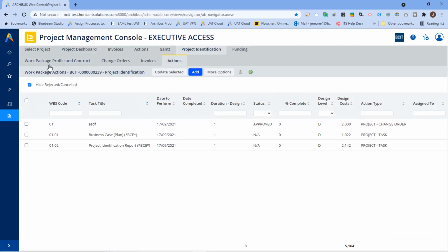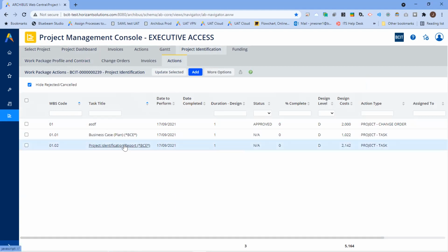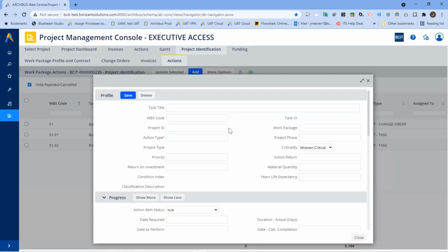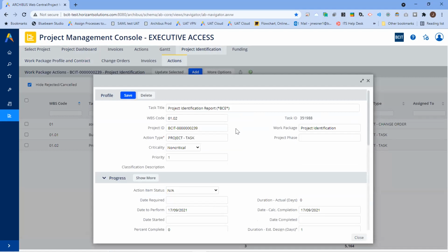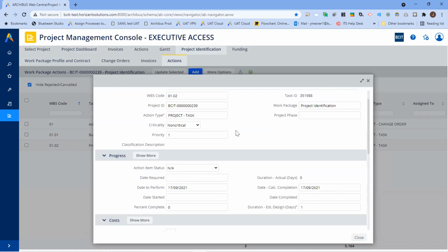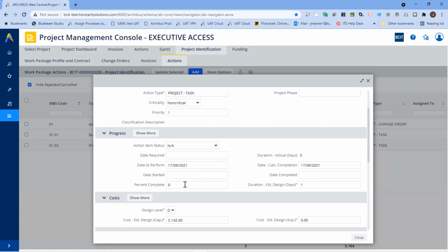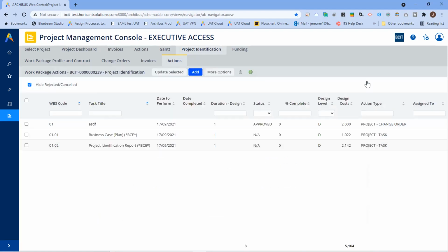One would be to go in from a work package perspective, look at the action tab, look at all the different actions that you have, and drill down on them. Anything that we flagged as mandatory information right now will be starred. Again, as Sean mentioned, there's going to be a couple places that are most germane for you, probably percent complete and any date requirements that you have, updating this 25, 50, however you work with your progress methodology. So updating tasks, you can also update cost information ongoing.